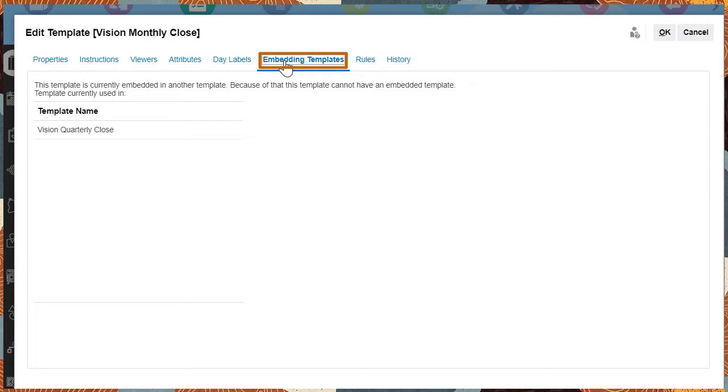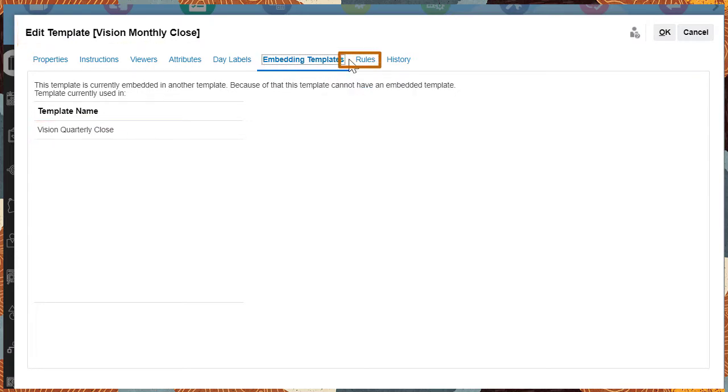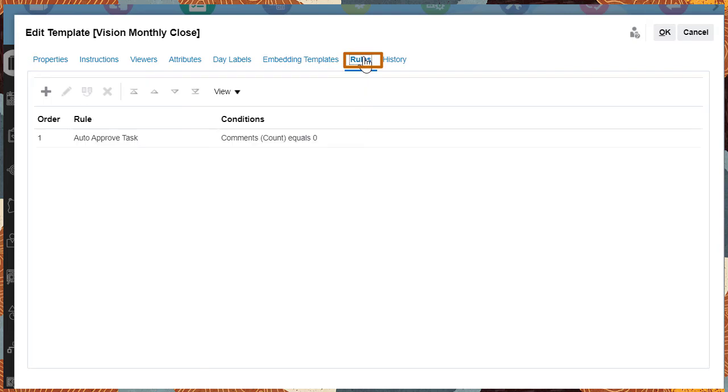For example, embedding a monthly template in a quarterly template, rules required for task completion or approval, such as disabling auto approval for tasks with open comments.